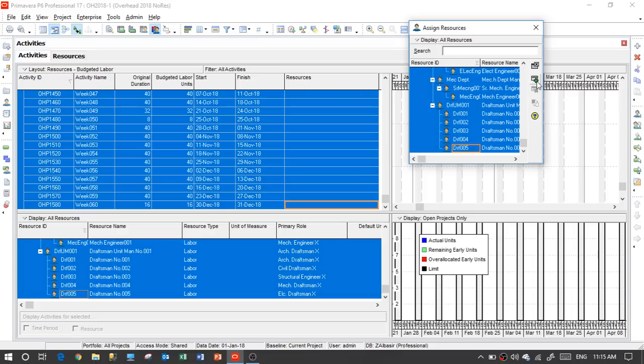Now, when we add all the resources, the budgeted hours will be more in this duration, okay? Which means it's calculated that this team is fully booked to the overhead. Now, if we go for fewer hours than this, that means the KPI for the overhead is good. And if we do it also for the resources one by one, we will monitor it and see that the KPI for each resource is good too. For example, in the first week, which is 32 hours, or this week in front of us, week 47, which is 40 hours.